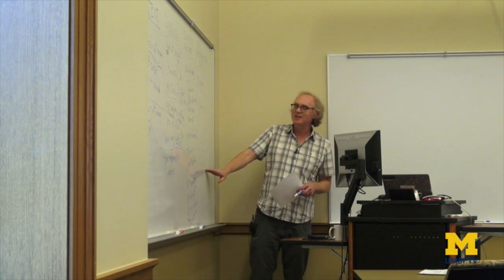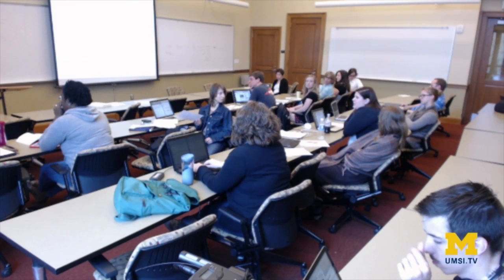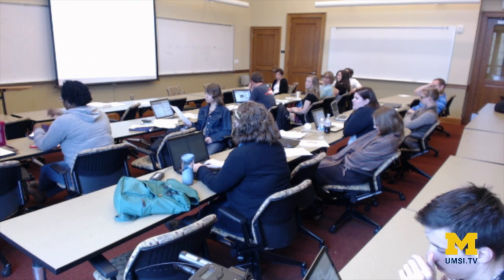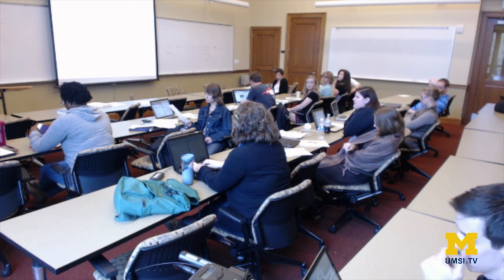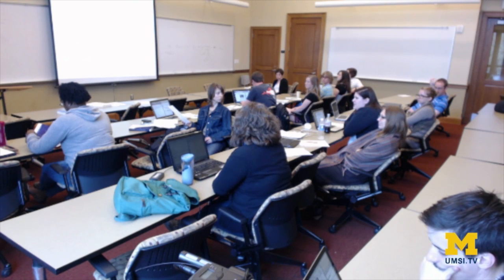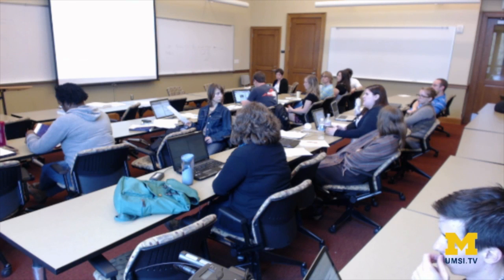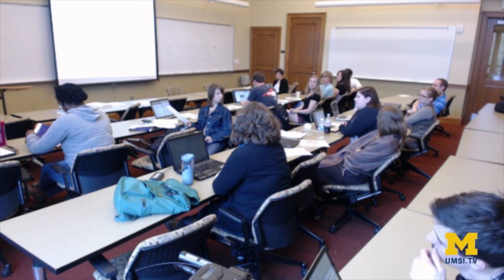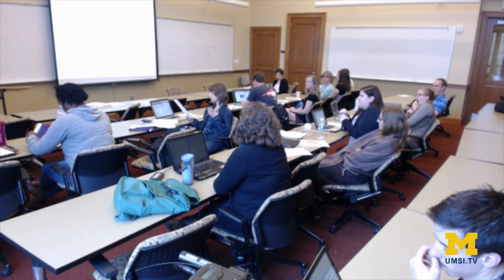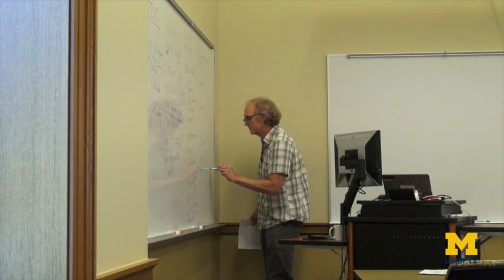And then finally, the key implementation issue, if there was one. Because of the way it was set up, there wasn't a real implementation, but one of the really interesting implementation ideas that he had is he gives a step-by-step of how to pick units to test the new software first, how to assess their success using the software, how to move from "it worked in these 6 units" to applying it to a whole business. Right, so start small and build out.